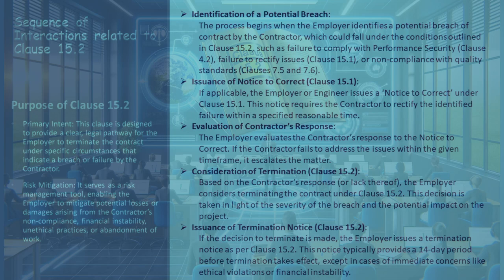The employer then assesses the contractor's response to the notice to correct. In cases where the contractor does not adequately address the issues within the stipulated timeframe, the situation escalates. Depending on the contractor's response or inaction, the employer contemplates terminating the contract under Clause 15.2, with this decision influenced by the breach's severity and its potential effects on the project. Should the decision to terminate be finalized, the employer issues a termination notice following Clause 15.2, typically including a 14-day period, except in instances of urgent concerns like ethical violations or financial instability.